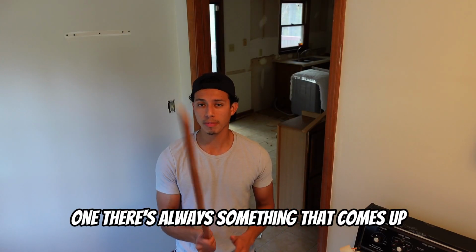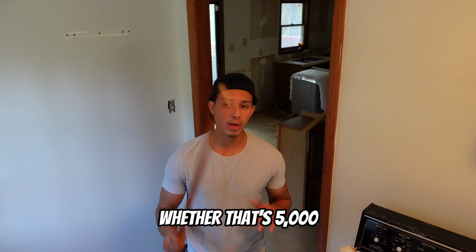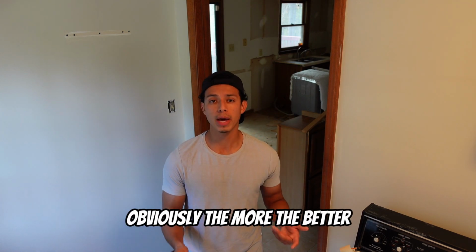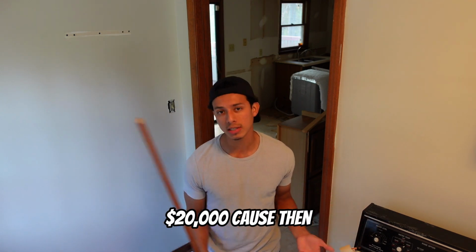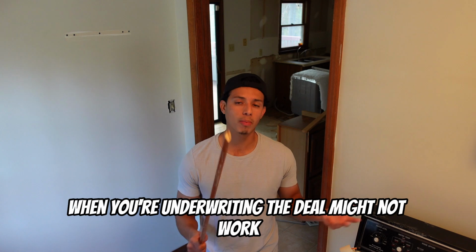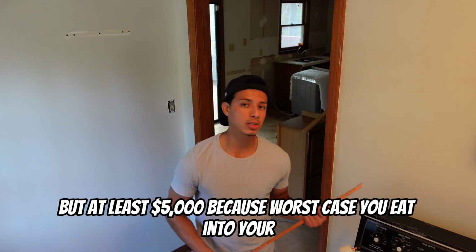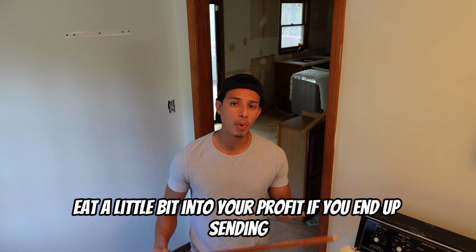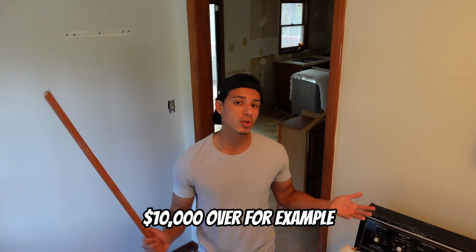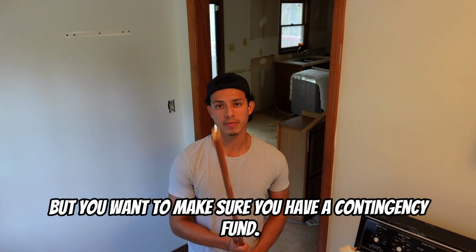There's always something that comes up. So you want to make sure you have a contingency. Whether that's 5,000, obviously the more the better, but it's understandable if you can't have like 10, 20,000, because then when you're underwriting, the deal might not work. But at least 5,000, because worst case, you eat all of your contingency and then eat a little bit into your profit if you end up 10,000 over, for example, but you want to make sure you have a contingency fund.